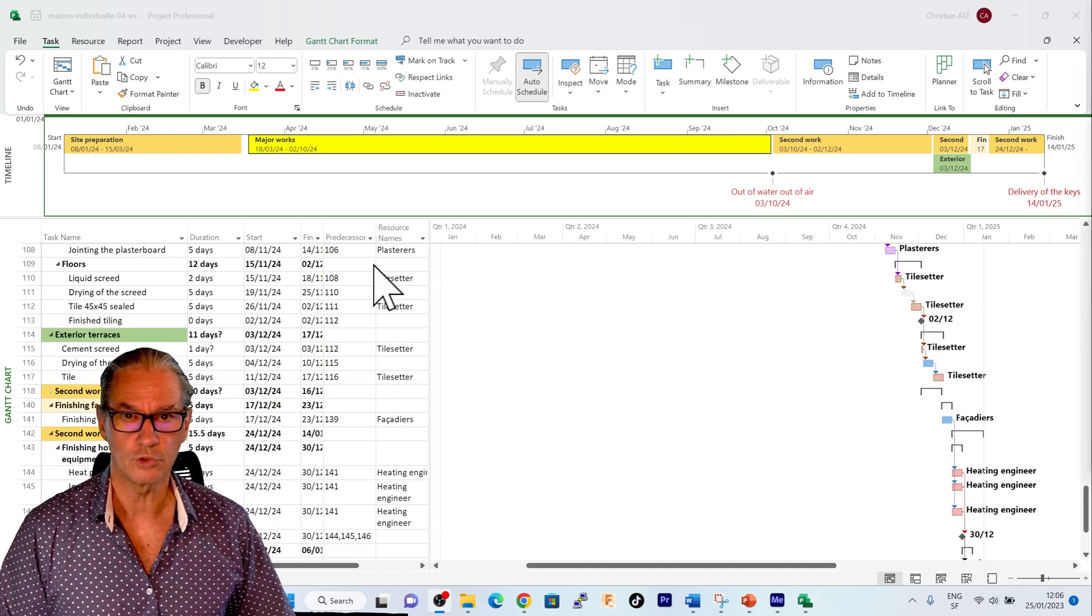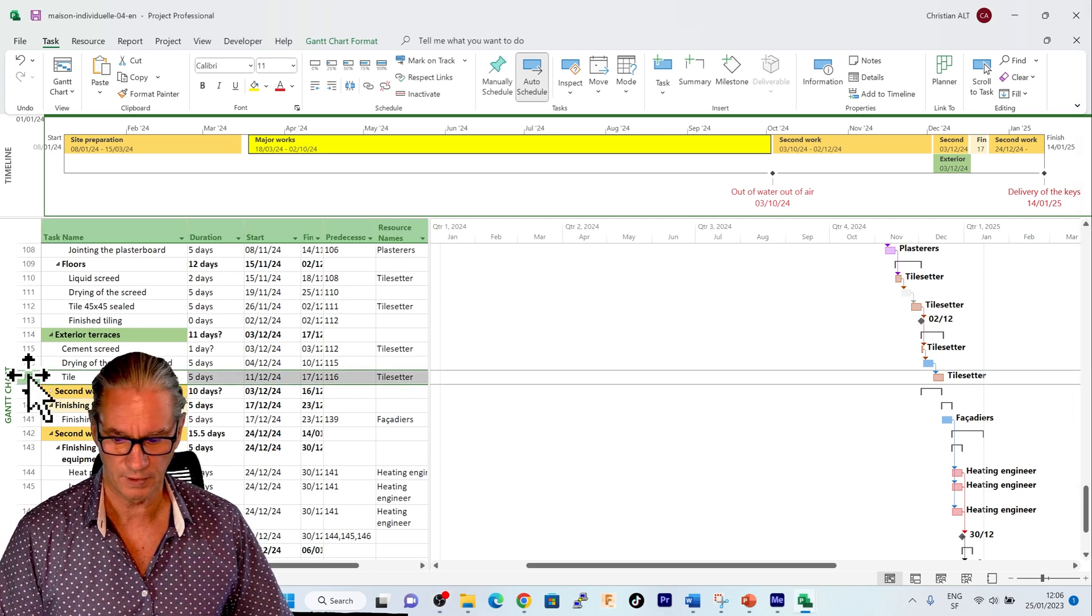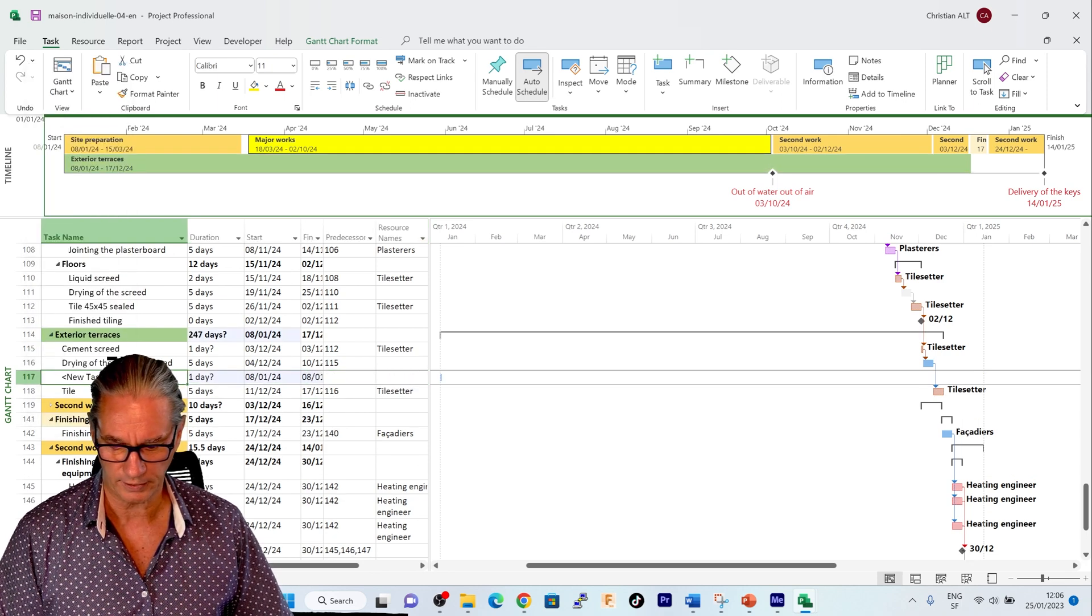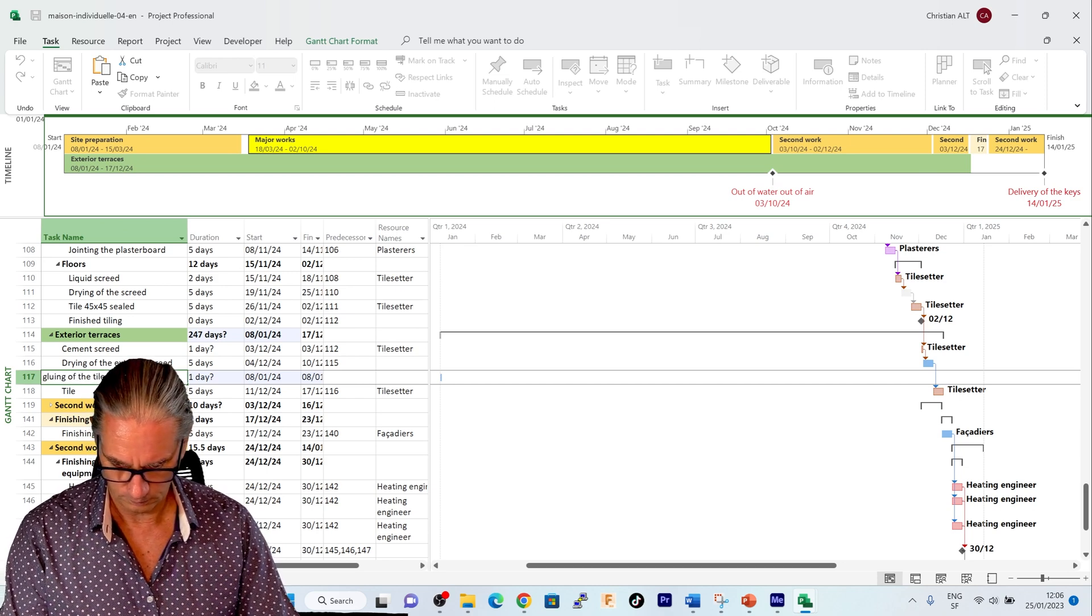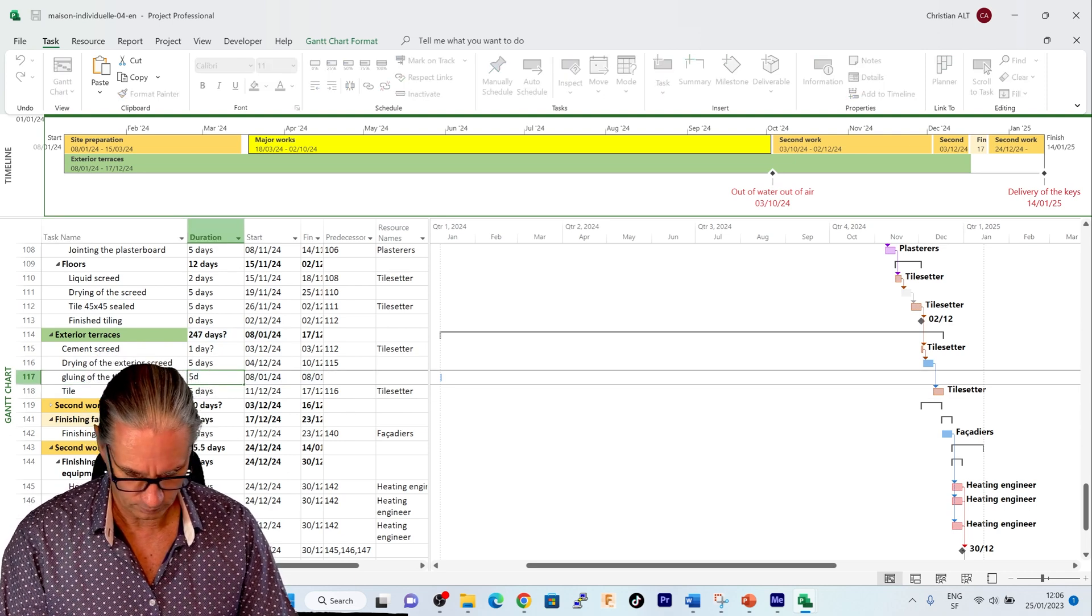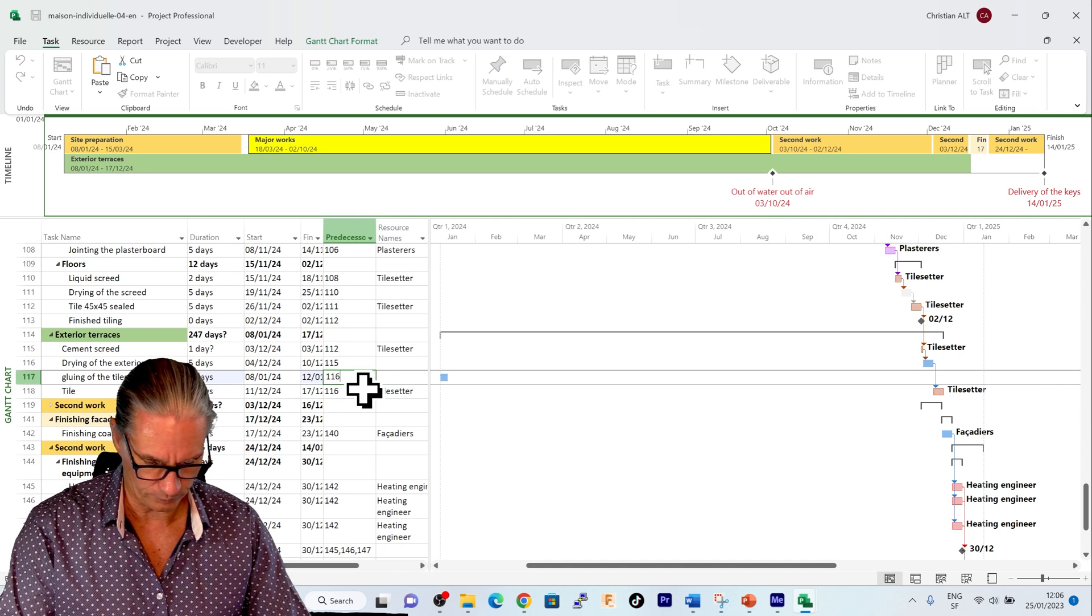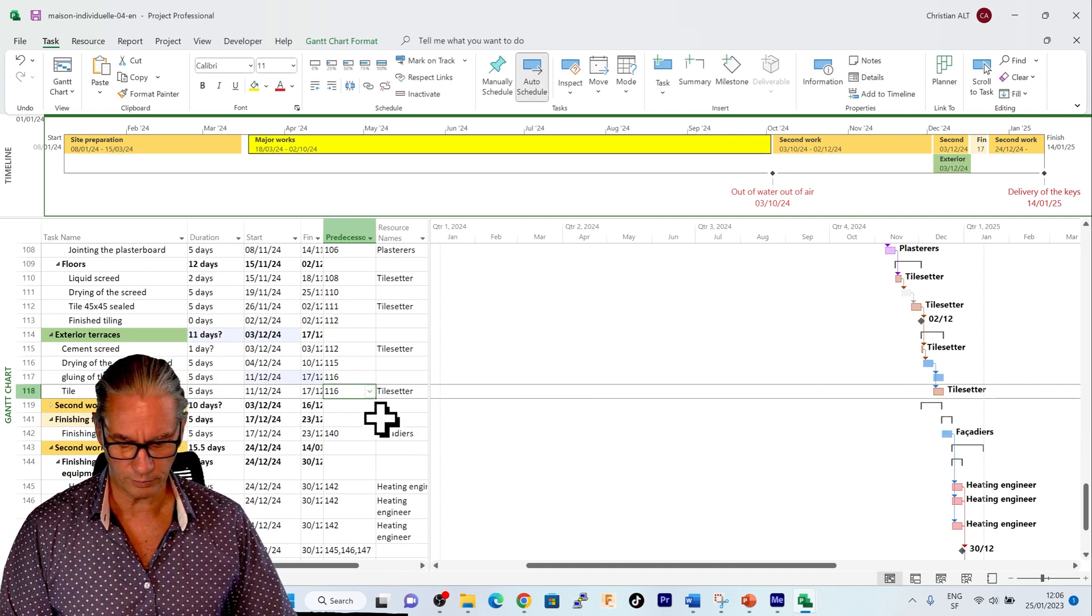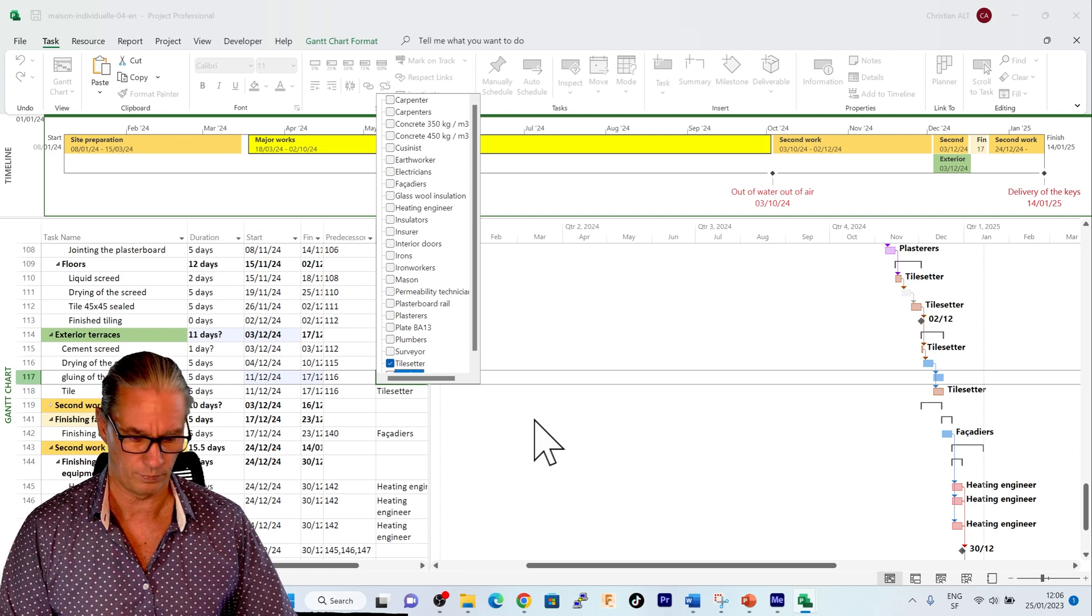To check what we've done, I will come here where we are doing the exterior terrace. And I will insert a task which will be gluing the tiles. I will give it a five-day duration and set the same predecessor. So we see that it is blue here for the moment. And as soon as I will define here the tile setter we'll see the change.